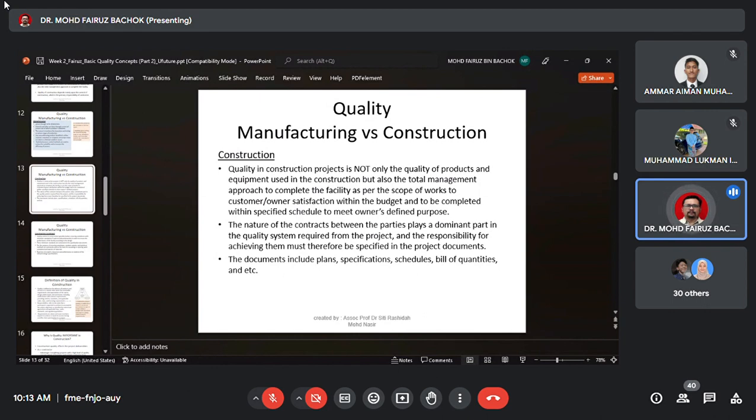Once there is a delay without a concrete justification, then the parties pay all the extra budget, and the worst thing is the client can summon you. Based on the day, let's say one day is 1,000, we agree in the document. So if you delay 2 months, then you need to pay an extra 60,000. That's so much, it involves a lot of money. It's a 1 day delay that charges you 5 million. Just imagine if you delay for 1 year.